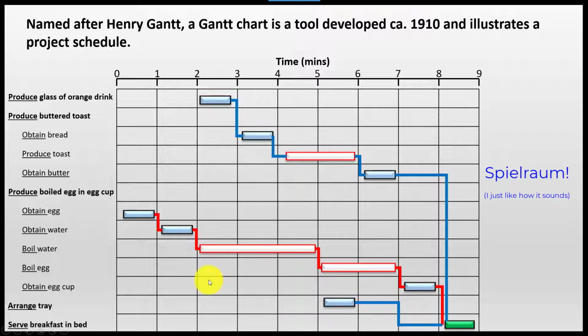And that means that in terms of risk management, we want to allocate most of our control resources to that critical path, because that is the bottleneck. The bottleneck is the step that defines the speed for the whole system. That is the principle of the bottleneck. In this case, the critical path is the path that defines the duration of the project. If you have 1 minute of delay here, you will have 1 minute of delay on your whole project.